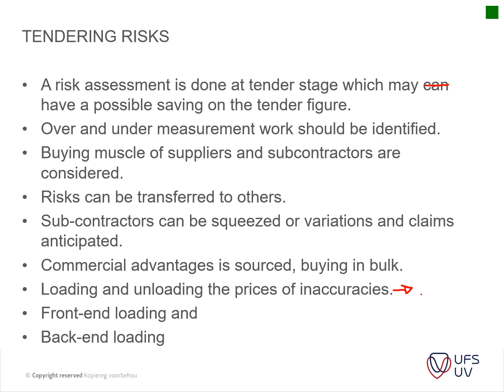Okay, front-end loading, that's what I was talking about just now, where you load your items at the front of your project, for instance your excavations, your concrete work, and so on. Obviously, you do that discreetly, and you only make slight changes at the front, because the bigger you load at the front, the higher your risk will be.